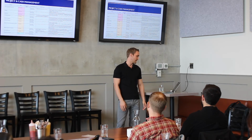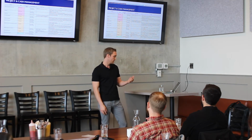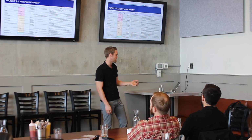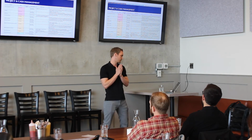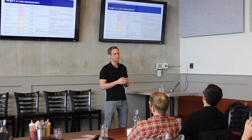So again, on project management, we have weekly phone calls with our property managers. During those weekly phone calls, this kind of serves as my to-do list, but this is my project list. So starting on the left, those are projects, the status, again, in progress, not started, done, completion date, your project team, any action items for myself, and then notes.